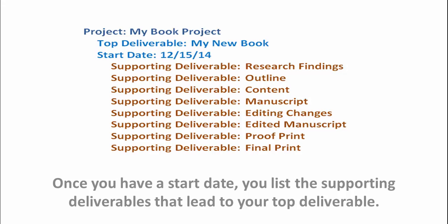Next, you try to list a handful or so of supporting deliverables, and these are the deliverables that lead up to or contribute to your top deliverable. Here you can see we've got a sequential list of supporting deliverables that start out with research findings up here and end up with a final print down here.